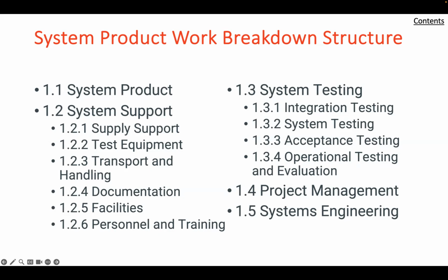Keeping track of the actual cost is essential along with the actual time required to develop a system component. Project cost control is then exercised by comparing actual reported cost against estimated cost, identifying and focusing attention on those work packages that deviate seriously from initial estimates. If any new work is required to be carried out, estimations are needed for this and to see if it can be accommodated with the final amount in the budget.